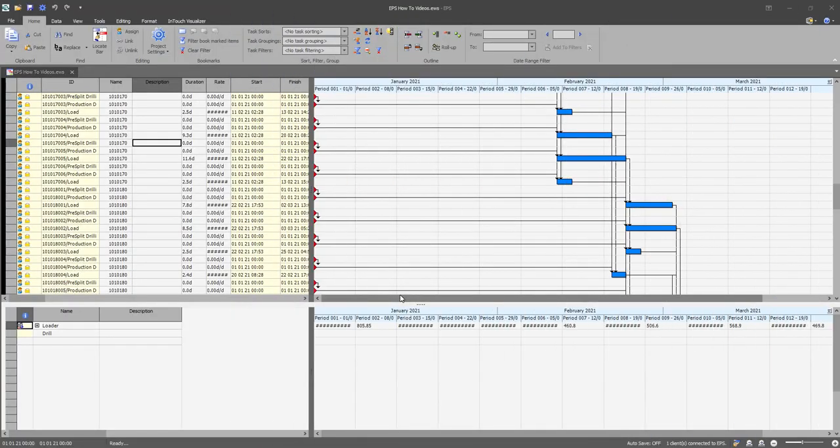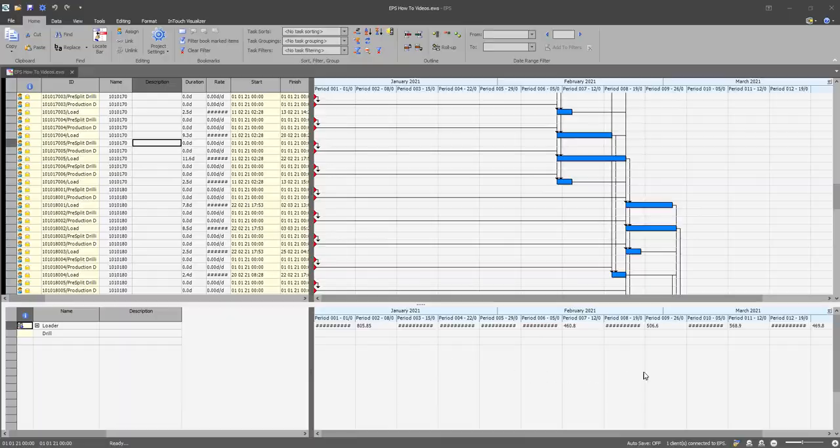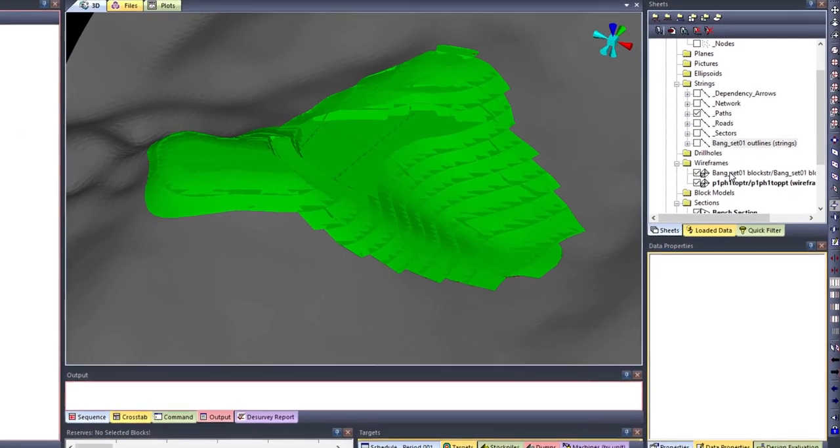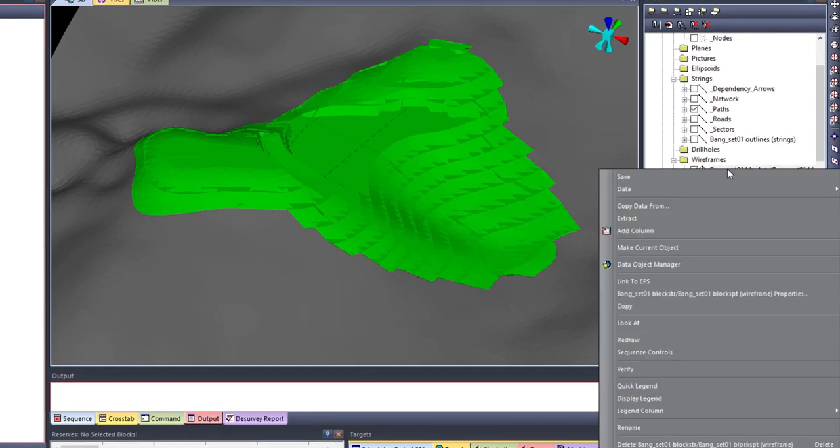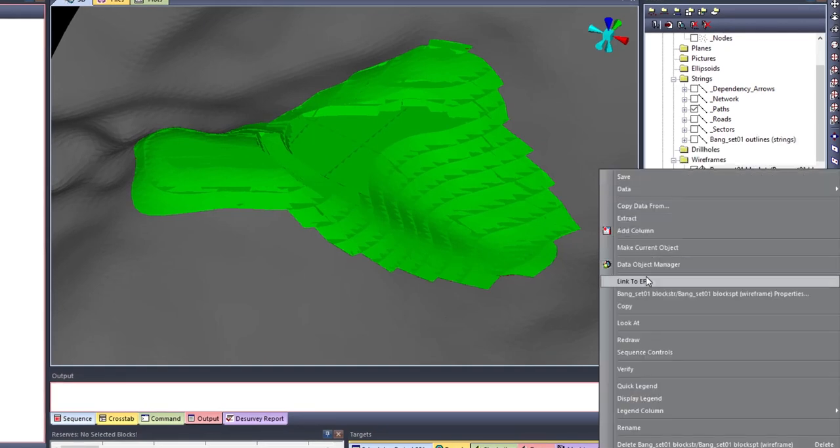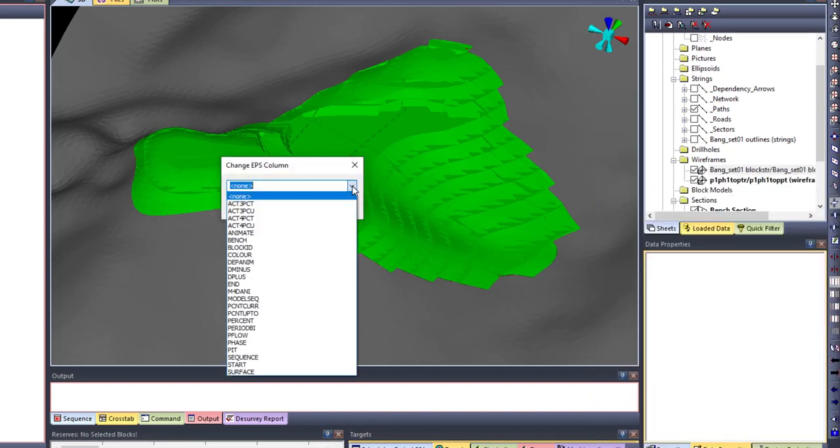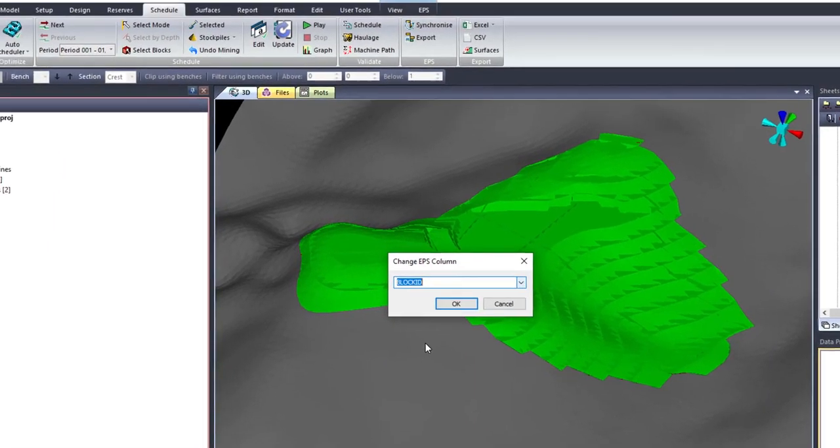Once you have sent data from Studio OP to EPS, you can link the mining block so that you use Studio OP's 3D window for 3D visualization. You do this by right-clicking on the mining blocks on the sheets window on Studio OP, selecting the link to EPS option and then link by the block ID field.